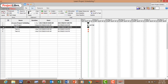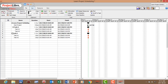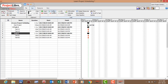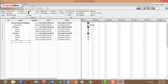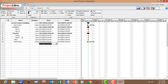Let's create more tasks. I'll copy Task A, paste it, and rename it Task B with sub-tasks B1 and B2 — indent those. Then create Task C, indent it. Finally, add a 'Finish Project' milestone with duration zero. So now we've created all the tasks.